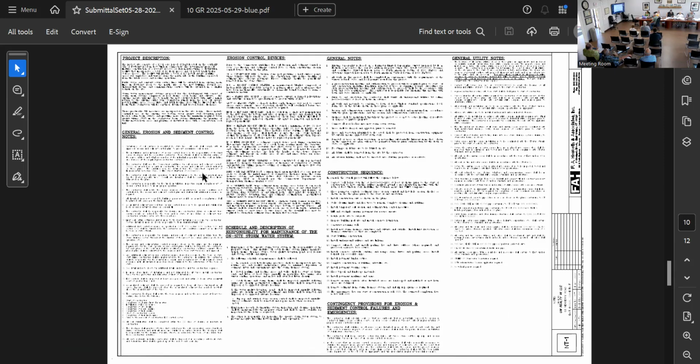And the note sheets include details of the soil erosion and sediment control required by state statute, have a narrative, and have descriptions of what we're proposing in a construction sequence. That's outlined on there. And we do have a stormwater long-term maintenance plan that we've included on there. Basically, keep the site clean, make sure the sediments are cleaned out of the detention basin, and cut the woody vegetation out of the detention basin so that roots don't protrude.